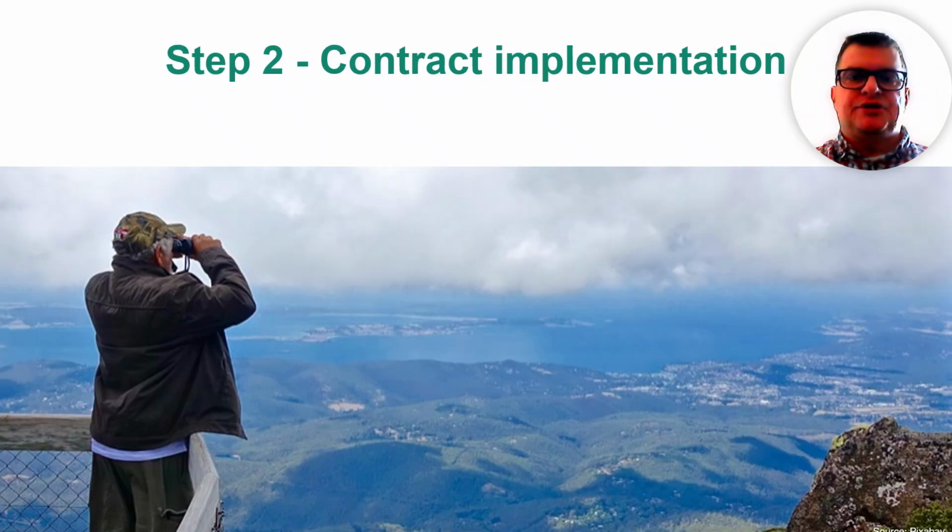One of the most efficient methods for spotting red flags in public procurement is by directly observing what is happening at the construction site. It is here on the ground that discrepancies between contract terms and actual implementation become visible. Signs such as delays in progress, substitution of agreed materials, or unexplained changes in scope can all indicate potential risks.